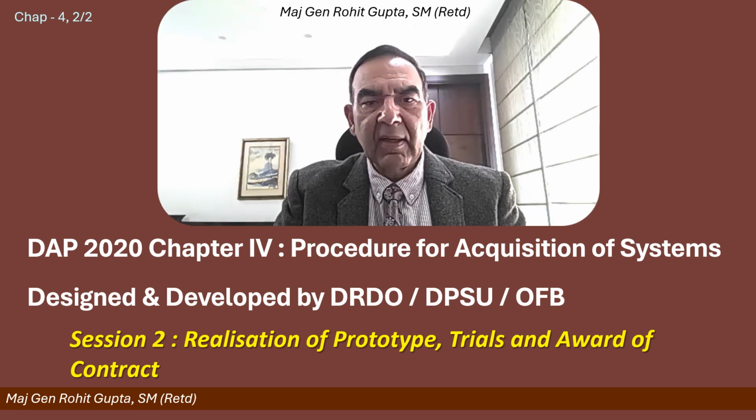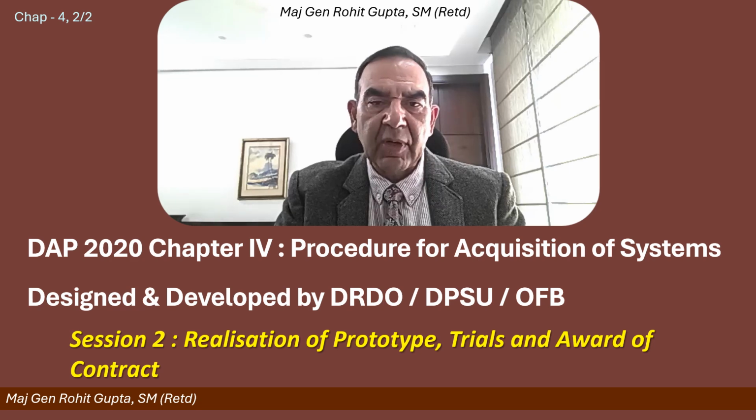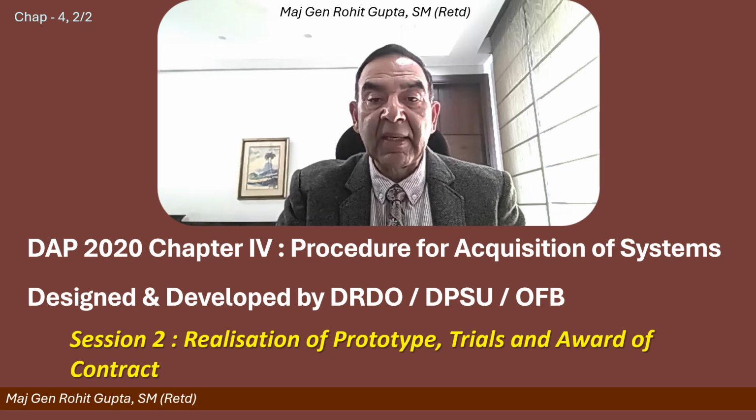In session 1, we had a look at the complete flow chart up to the level of the design and development of the prototype, as well as the JPMT and the PMT as to how it monitors the product. Keep in mind, it is important for the development cum production partner to be a part of the design and development phase if we have to easily absorb the technology and get on to the production. We found many cases failing because of this factor.